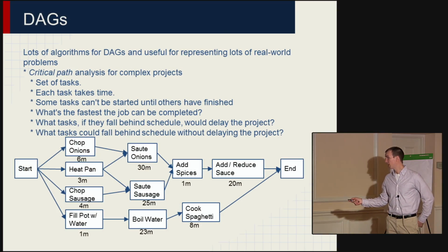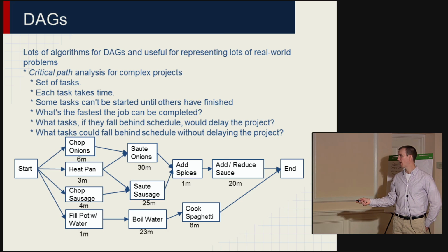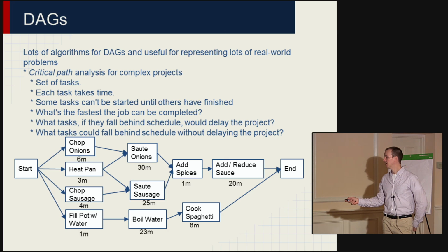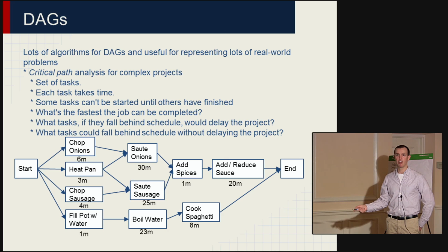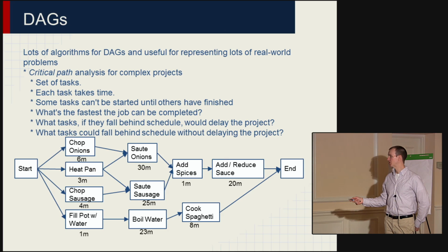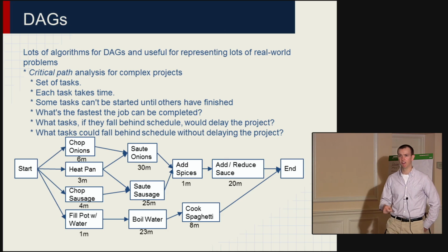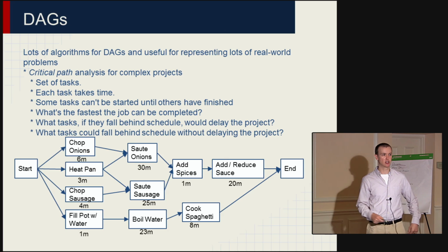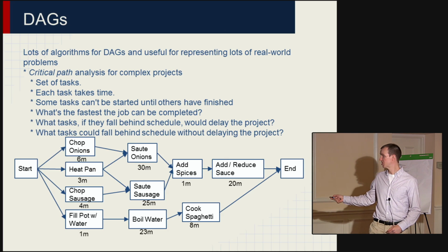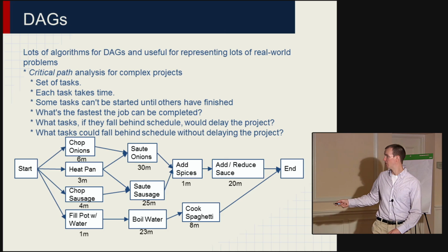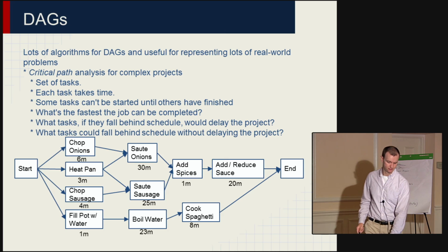So in that algorithm, you work from the end and you work backwards and figure out how long you have until you get from any vertex to the end. Then you get your way all the way back to the start, and then you can figure out how far it is from the start to the end, and if you've written down information along the way of what was your slowest step, then how you go from the start to the end.